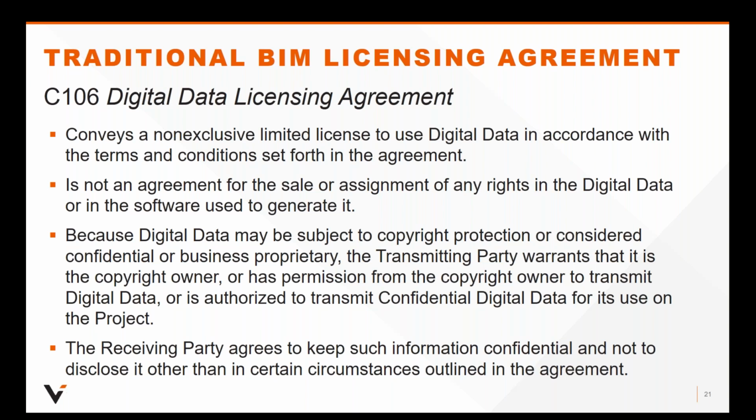Now, again, parties that have previously executed AIA agreements for design services or for construction have already entered into licensing agreements pursuant to the provisions of their agreements, the A201 or the B101 and the subcontractor agreement, to establish the protocols for the transmission of digital data, including BIM information, or restrict the usage rights permitted in those agreements. Parties use the building information modeling exhibits such as E201 or E202 and incorporate them by reference into their pre-existing agreements. Right? So that sets up those relationships. But in this case, you don't have those relationships, so you come up with a different licensing agreement.